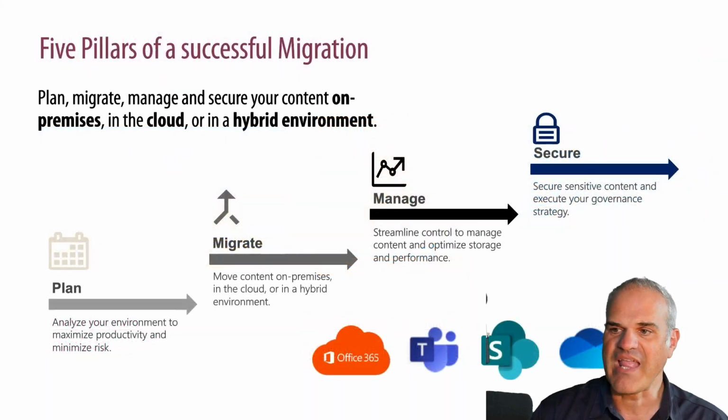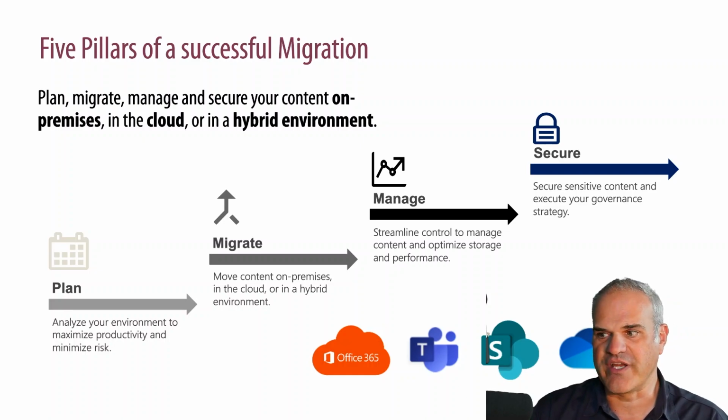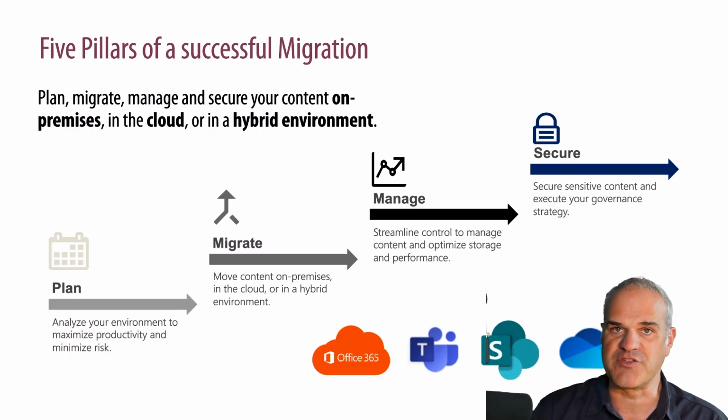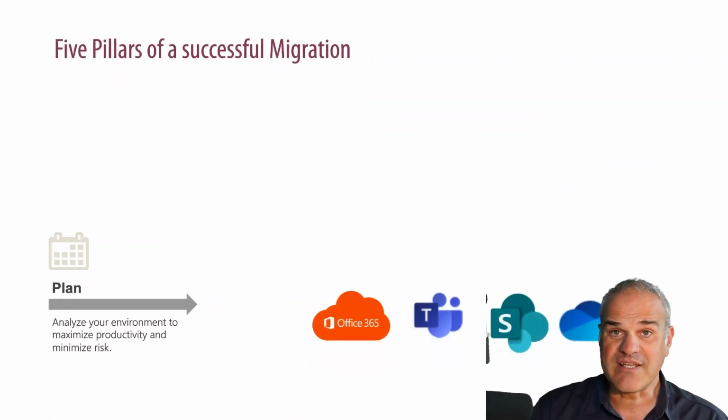And I would like to show you in my presentation why you shouldn't start a migration from one tenant to the other tenant directly by clicking a migration button. So it's so important to start with a pre-preparation phase, a planning phase, then migrate, and then at the end, make sure that after the migration, you can manage the new content and then the new environment is secure and compliant and safe.